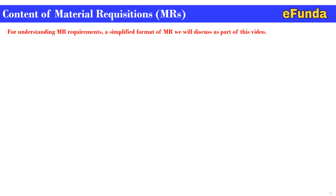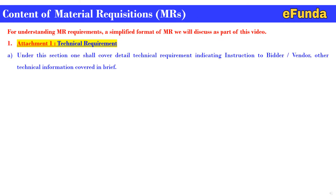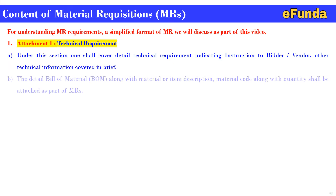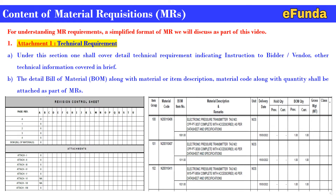Content of material requisition: for understanding MR requirements, a simplified format of MR will be discussed as part of this video. Here we will see Attachment 1, which is the technical requirement. Under this section, one shall cover detailed technical requirements indicating instructions to the bidder or vendor, along with other technical information. The detail bill of material (BOM) along with material or item description, material code, and quantity shall be attached as part of the MR. A typical MR format using a revision control sheet is shown, where attachments are listed on the left-hand side.